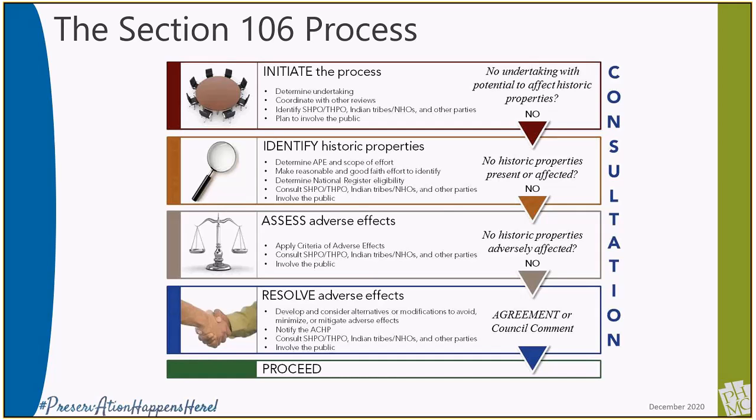The SHPO will request and require documentation of the effort to identify consulting parties when the project has the potential to cause an adverse effect on historic properties. Please note that the required HUD public notification process does not satisfy the need to seek out specific consulting parties for a particular project with an adverse effect on historic properties.